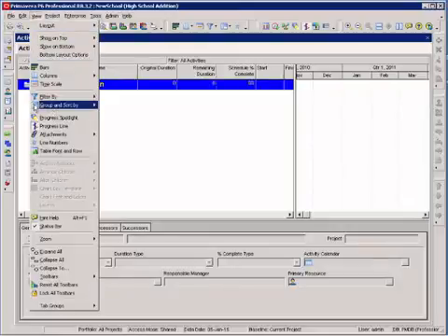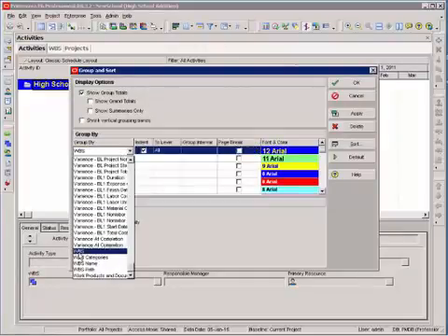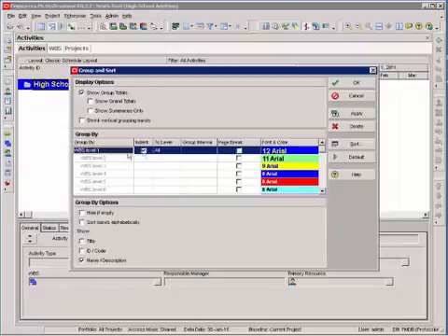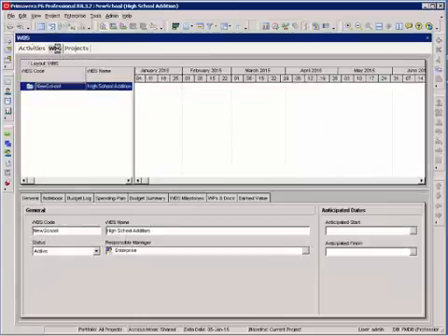Once again, if you'll notice that icon, I can select the Group and Sort By button. Make sure that your Group and Sort By is set to Group and Sort By Work Breakdown Structure, WBS. Then your heading will show. And as you build a WBS, all of your headings will be built in the Activities view.